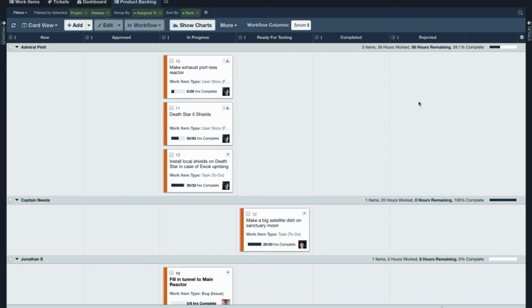One of the big discussions that often happens as part of a Scrum team is something known as WIP, work in progress, and making sure that we don't have too much work in progress as individuals. If I have 5 things in progress, now I'm context changing all over the place, which just slows me down and makes me less effective and less impactful. So that's something that's usually discussed at retrospectives and at planning. It's part of maybe even our definition of done, as to how much work in progress one individual can have.